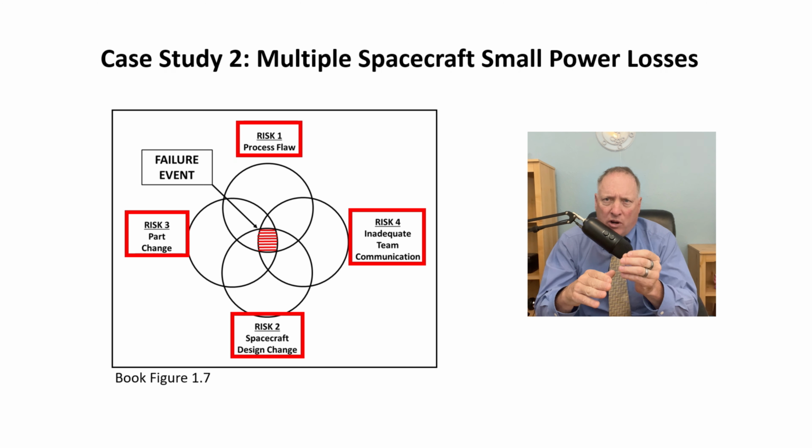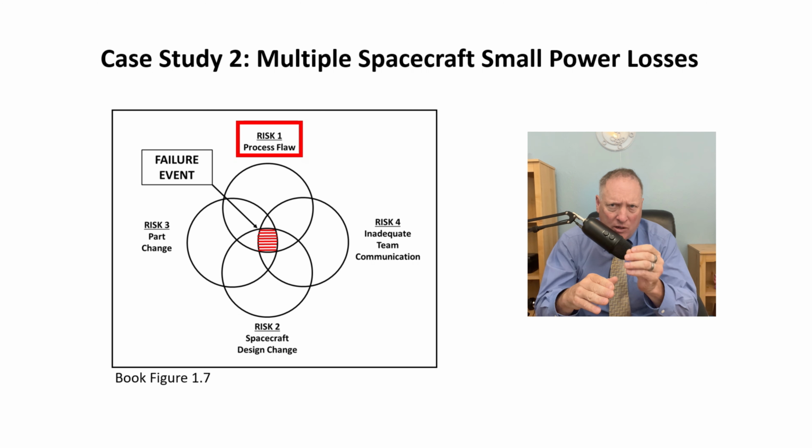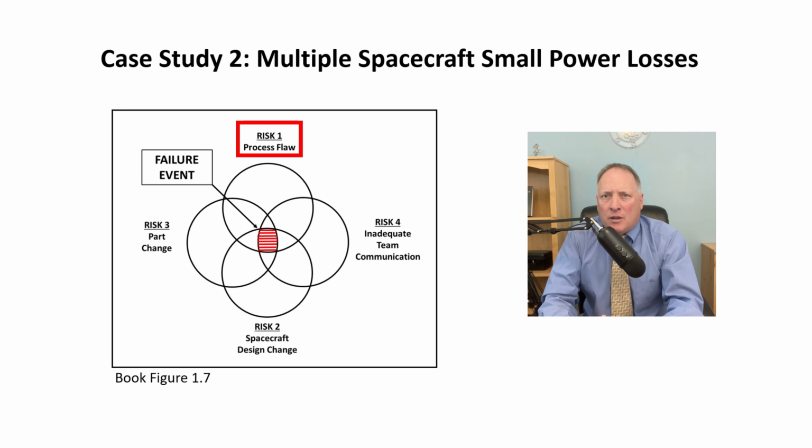Risk 1 was a new part and process that were added to the heritage product. One step in this new process was not tightly controlled, which introduced a spectrum of possible damage to the product of an earlier process. The potential range of damage was none to significant depending on the technician and equipment. Ironically, the new part and process were added to protect the heritage product.